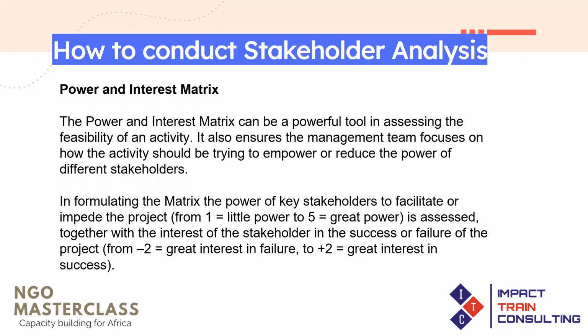Another method would say that you need to prioritize the stakeholders according to those who have the power and can influence your intervention and those who have an interest in your intervention. So when you have high power and high interest people, these are people that you need to fully engage with, and these are people you make a strong effort to satisfy. And when you have people who have high power and less interest, these will be people who you should satisfy, but not to the extent that they become bored with your message.